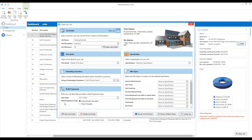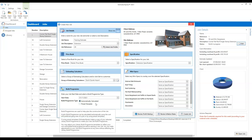You can select whether you want to use the automatically calculated build program or a template. The automatically calculated build program will take the labour times from within your estimate, look at the calculations for all the labour, and formulate the build program based on those. The other way is to use a standard build program template — that's an out-of-the-box template that you can then edit yourself. For today, if you select the automatically calculated build program, in our fourth session I'll talk you through how that all works.